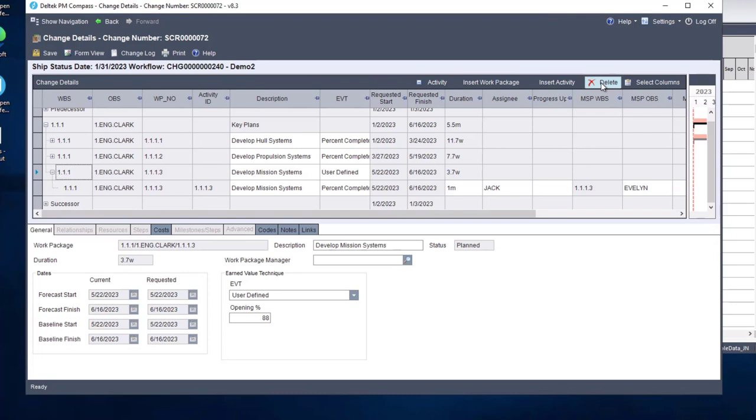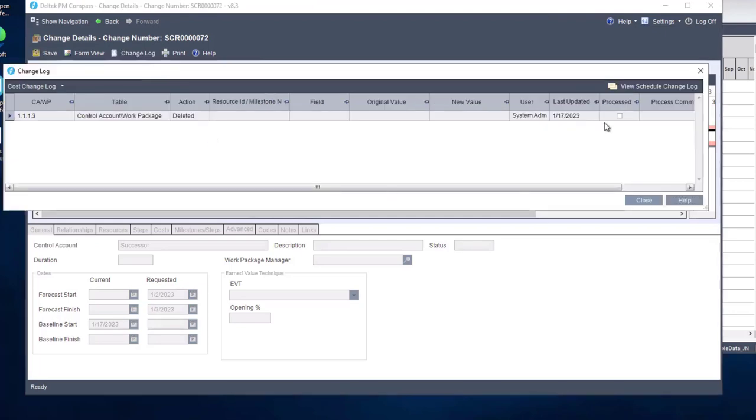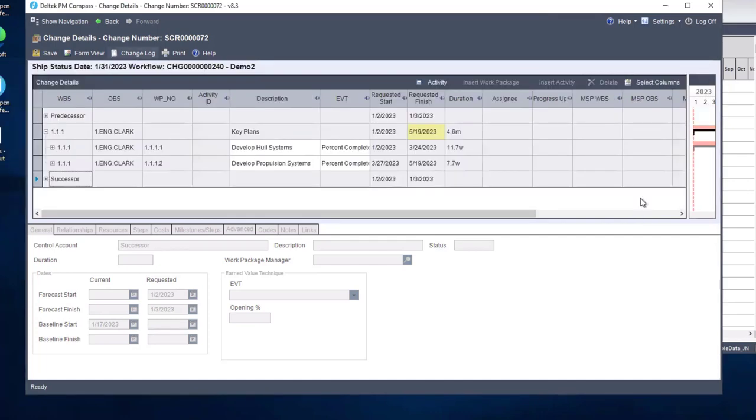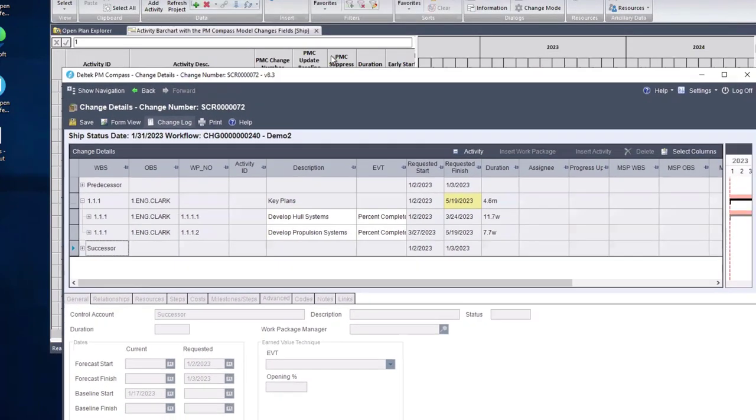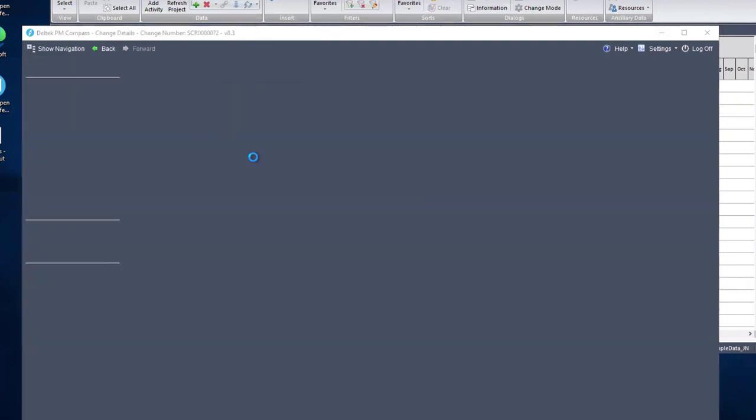Well, first of all, I think Mike asked, why do we have two different types, new or change amount and a replacement? We have two different types because if you want to use new or change amount and you want only the new amount, let's say I had a resource ABC on there and I added 20 hours to that resource as part of this change request, and it uses a different set of rates than the original one. The only way to implement that is a new or change amount. So that's why we have two different options.